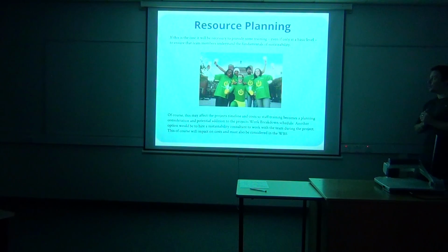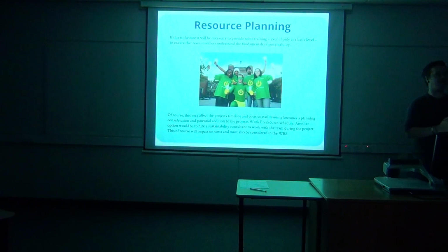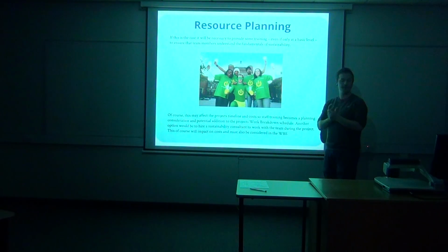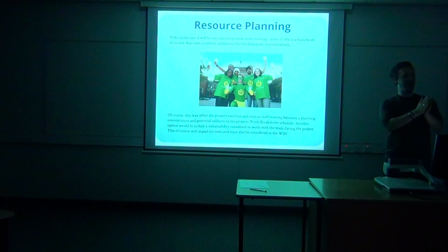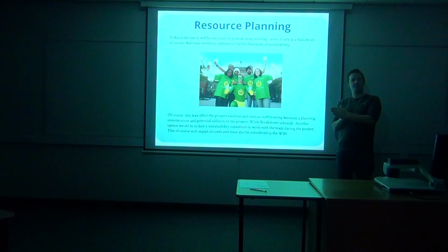What they did in the Olympics is they had a toolbox talk for sustainability. One of the key things they wanted to do, of course, was to provide the most sustainable games ever. That was one of their reasons that they won the contract in the first place. And so they had a sustainability talk. So every single person that came onto site had to sit through the talk that told them why sustainability was important for the Olympics, how they were going to deal with it, and what their responsibility was.